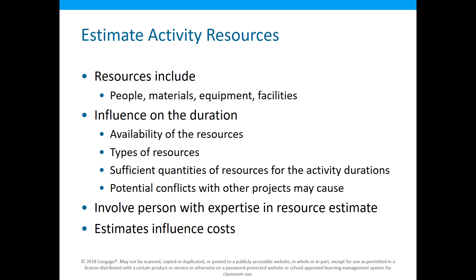These can all affect the duration of that project. If I don't have enough equipment to do the project in multiples — if I have to wait for the backhoe to get done and move to another area to dig — that can affect the time. Those estimates are also going to influence our costs. Right now, with COVID, some people are unable to work or do jobs, and that affects our resource leveling.